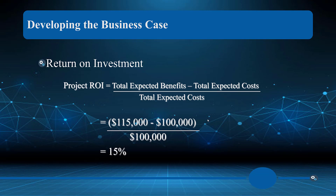We can also find the break-even period — the two kind of work together. Our organization may have a minimum ROI threshold: we've done enough projects to know we have to hit a certain percentage before taking on an optional project. We could also do projects with no ROI where there's a cost but we're required to do them to stay within regulation, and those costs have to be built against revenue.